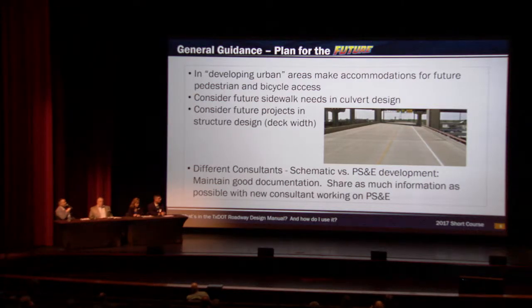Many of y'all probably know this, we are submitting a monthly report to FHWA for each letting on the STIP and NEPA status for these projects. And so to minimize delays because of that, be mindful as you're developing your project, and follow up with TPP and environmental division when you think that you might have something that could potentially change your STIP or your NEPA.